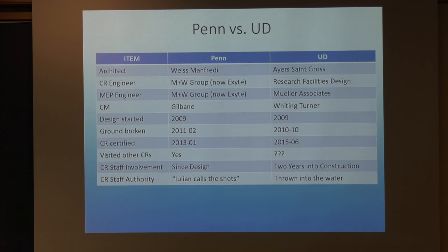In terms of design and construction, we have different architects, clean room engineers, and MEP engineers. What I liked very much at Penn was that the same engineer was in charge of the clean room and the rest of the building. When you have that scenario, there is less chance of miscommunication, system mismatch, and so forth. Different construction companies.